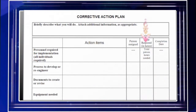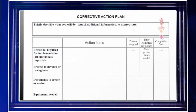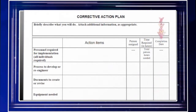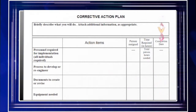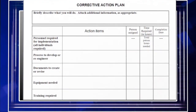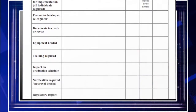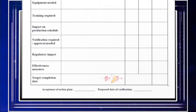Next to that, you're going to put in the actual time that will be devoted to that activity. And finally, the duration — how long it will take before that particular activity is completed. As you're putting your plan together, you'll find that the completion of one activity is predicated on the completion of other activities beforehand. When you're finished, you'll have a complete indication of all the activities that need to be done, and down here you will indicate how long it will be before the entire corrective action plan is completed.